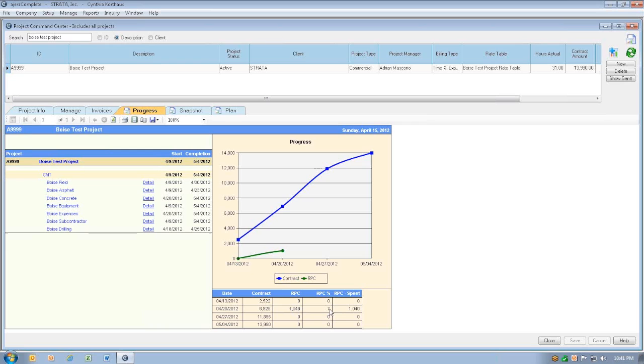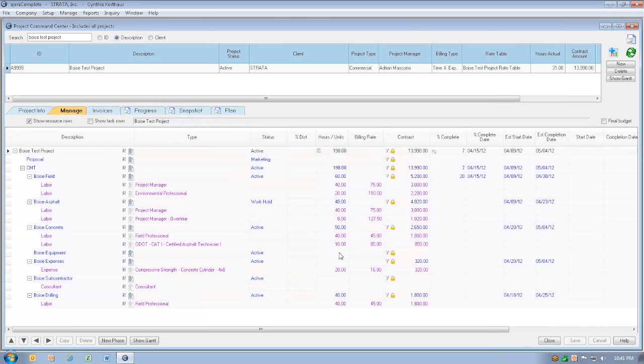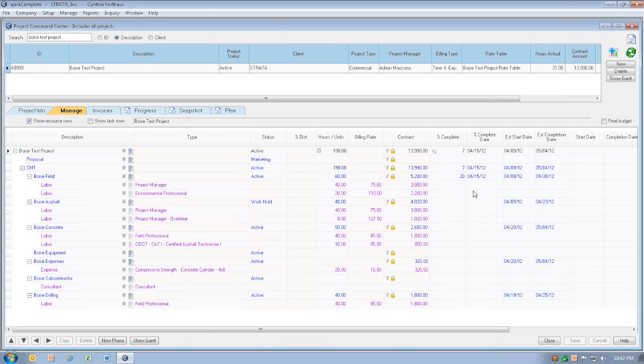This is a good chart to look at where you thought you would be in the project, based on your start and completion dates, with where you actually are. But in order to drive this report, we have to fill in three columns. We have to fill in the start and the completion dates. And we also have to fill in our reported percent complete here in the reported percent complete column.